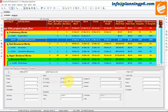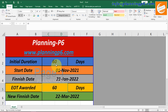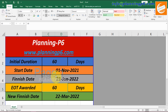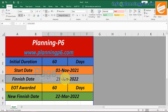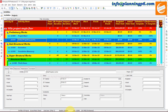Now move forward to Excel — I will explain what I have prepared here. The initial duration was 60 days, start date was 1st of November 2021, and finish date was 21st of January 2022 — this is due to the holidays included. The extension of time is awarded for only 60 days, where we add 60 days without including holidays, because the extension of time already accounts for holidays. So the new finish date is supposed to be 22nd of March. Now we have to revise our schedule as per the new finish date.